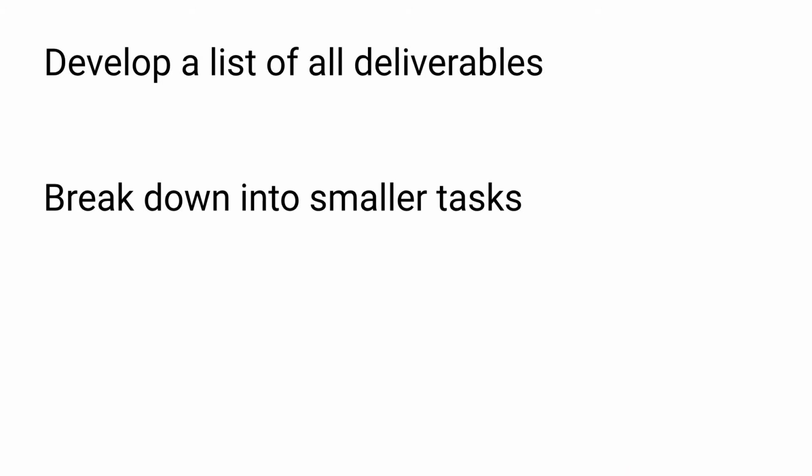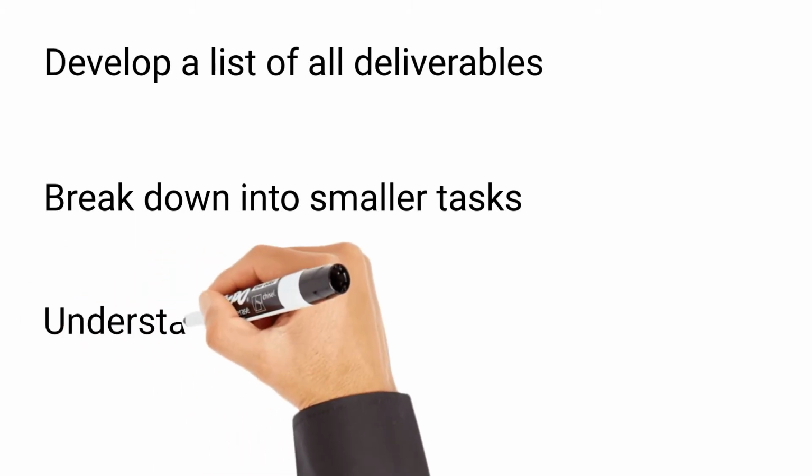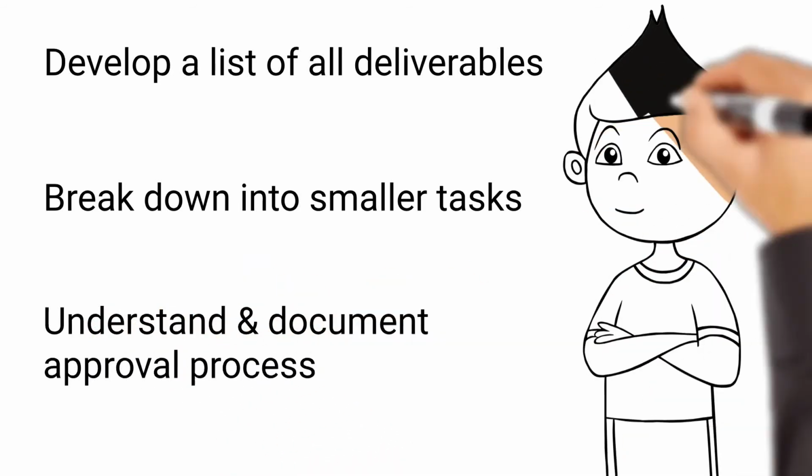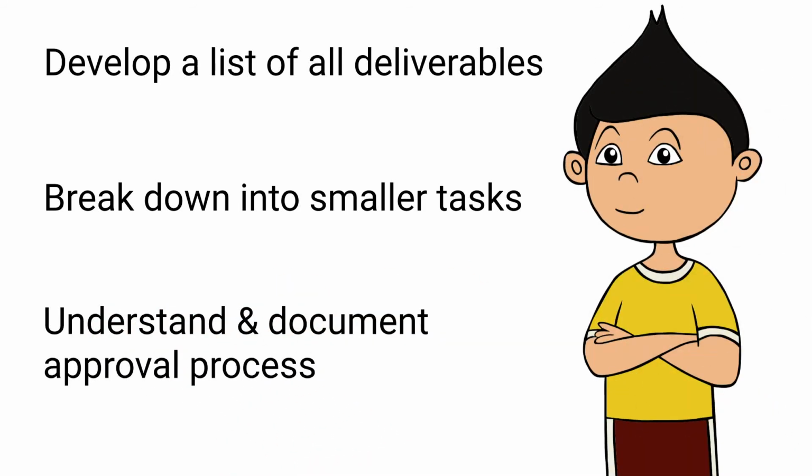Make sure that you understand and document the approval process for each deliverable. If your project is for an external customer, make sure you are clear on their internal approval process so that you're not surprised by delays or slowed down by wading through competing opinions.